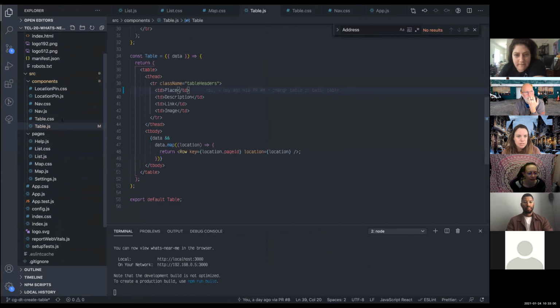That's kind of an obvious one, maybe. So here's one that you might be able to relate to from your previous TCL experience. The smart shopping list could have been one story, right? It could have been, as a user, I want a shopping list that learns my habits. That's pretty vague and broad. So, and there's a lot more stories than just these 4, but, as a user, I want to be able to create a new list, or as a user, I want to be able to add an item to my list, mark an item as purchased, view a list in order of when I need to buy them next, that kind of thing.